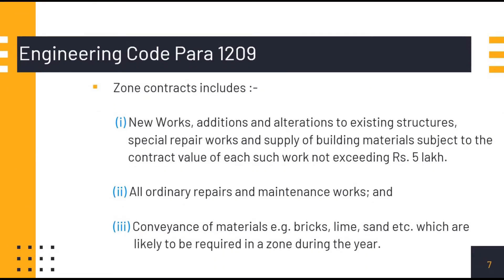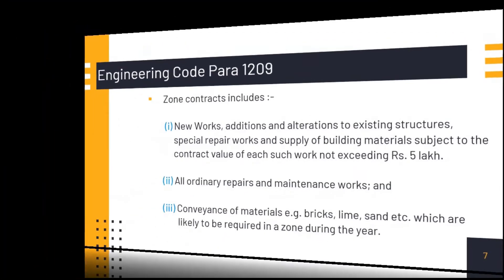The Engineering Code explains about the works included in Zone Contracts. Zone Contract includes new works, addition and alteration to existing structures, special repair works and supply of building materials subject to the contract value of each such work not exceeding Rs. 5,000, all ordinary repairs and maintenance works, and conveyance of materials — for example, conveyance of bricks, limes, sand, etc. — which are likely to be required in a zone during the year.